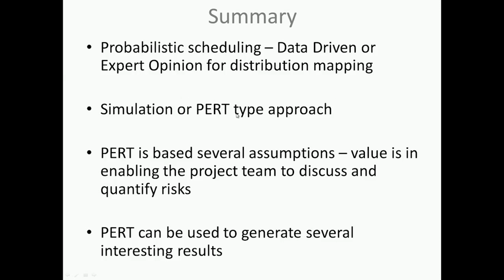Between simulation and PERT, PERT was very popular. It's really a very good methodical technique, but with computing power increasing, more and more people are shifting to simulation based techniques. One of the key reasons for that is PERT has several assumptions, and we saw several of these assumptions, which certainly limit the value of the results from PERT. But while the results are limited, there is a lot of value still in PERT to get the experts and the team together to quantify the risks, to articulate what the risks actually are. There is a lot of benefit in that.